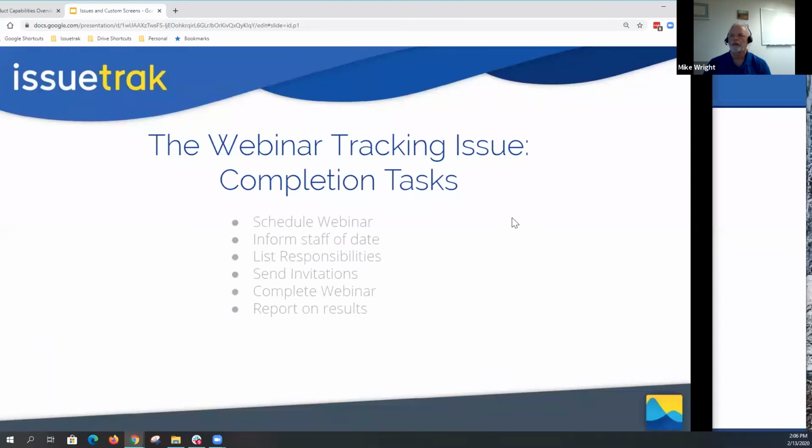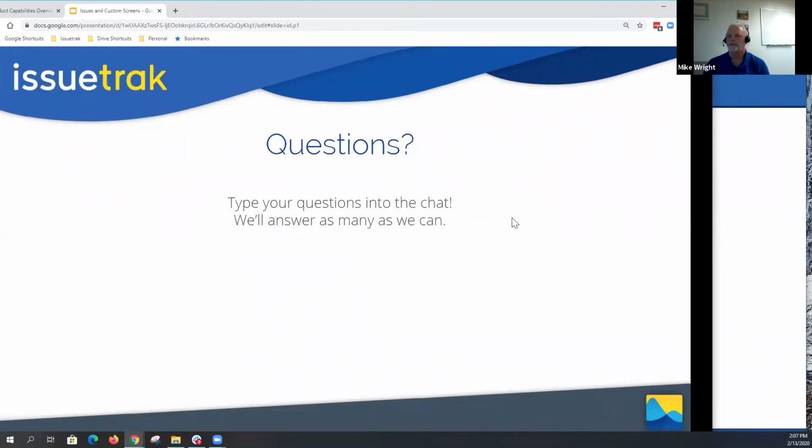I also wanted to do some task tracking because the tasks were helping me to stay on track with what needed to be completed. I wanted to be able to schedule the webinar. I wanted to inform the staff of the dates. I wanted to send invitations. I wanted to complete the webinar, and I wanted to report on the results. So here we are. I've got all these tasks, and I have everything going here to be done.